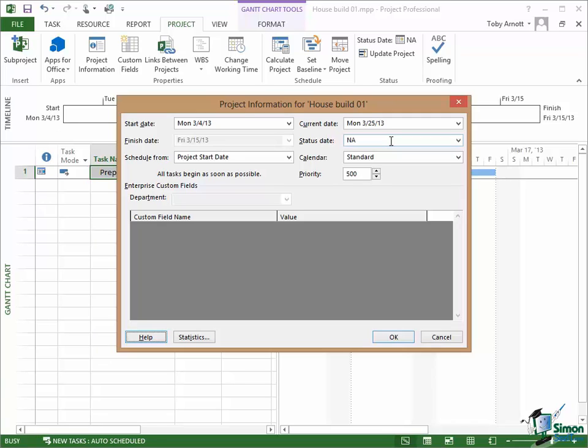A project will have a calendar and by default it uses what's called the standard calendar. You can have a number of calendars associated with a project. For example, some of the people working on it may have their own working hours and may have their own calendars and some of the resources you use may also have their own calendars as well. We'll look at calendars later on in the course.